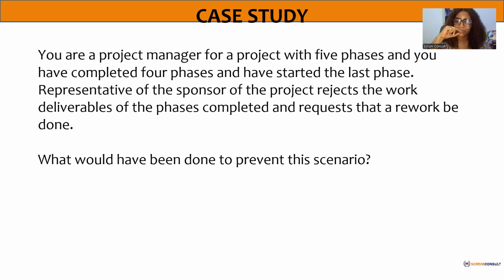Let's do that first. Validate is obtaining approval. Verify scope means checking whether the deliverables meet the documented requirements, probably quality standards. Most times it's always the quality standard.